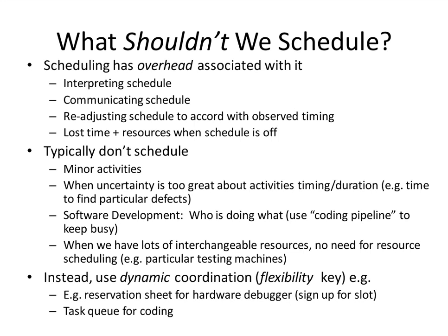3 to 6 tasks that will typically form major components of a given deliverable. You might want to really think about putting those in an order in terms of dependencies to make sure the tasks that need to start soon, because they're on the critical path, get going soon. So you're not left hanging towards the end of the incremental deliverable. So there are some things we don't schedule, but I am looking for you to schedule something.